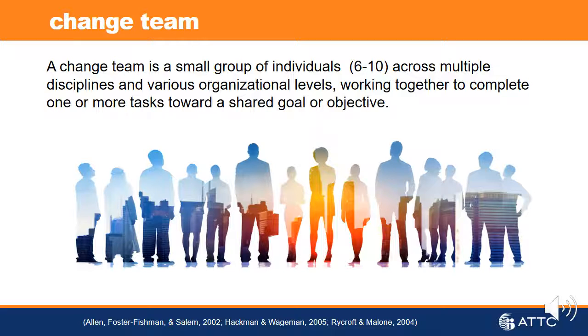The facilitator, in conjunction with agency leadership, will recruit and engage 6 to 10 individuals to serve on a change team. These individuals should represent varying levels and/or disciplines within the organization. The recommended size of the change team has been found to represent an optimal size for developing deep group cohesion, efficient facilitated shared decision making, and appropriately sized to ensure individual member follow-up on team tasks.